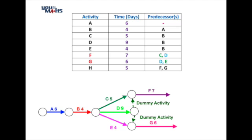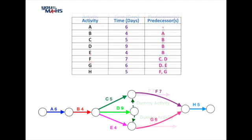Now we can place our remaining activity H at the end of our network because that follows on from F and G, and that's quite straightforward because there are two predecessors both leading into task H. H is not a predecessor to any other activity, so that's the completion of our network.